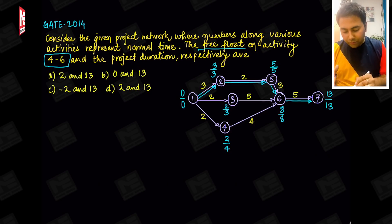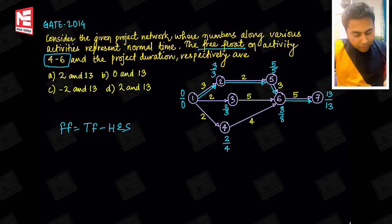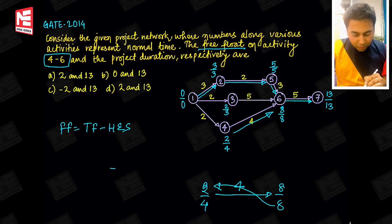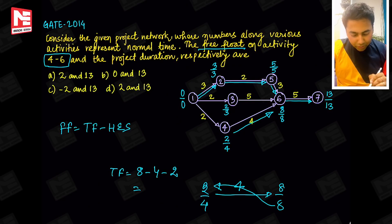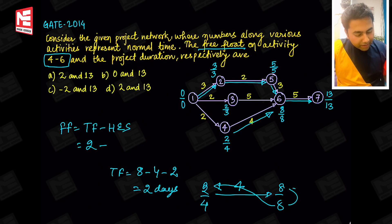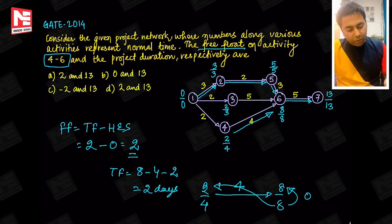Free float equals total float minus head event slack. For activity 4 to 6: duration is 2, early/late times are 4 and 2, and 4 and 8. Using the flying arrow: total float = 8 - 4 - 2 = 2 days total float. Head event slack = 8 - 8 = 0. So 2 - 0 = 2, therefore free float for activity 4-6 equals 2.